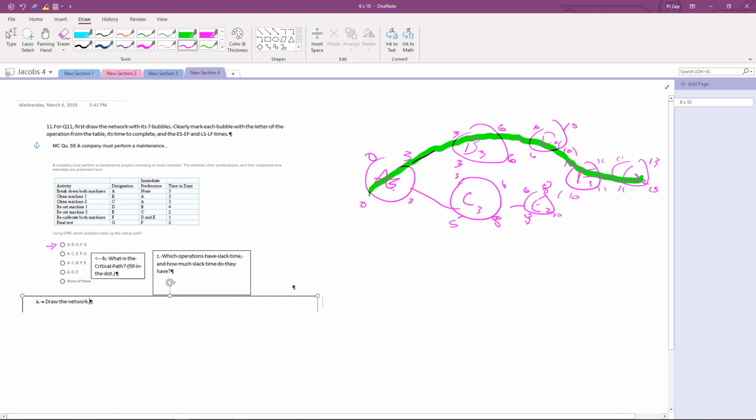And we already carried the 3 on the critical path back here because that's the limit. You have to think about that a bit, but that's the limit. There's no slack in A, we know that. It has to start at 0 and finish at 3. So we have slack on B and C, and they each have 2 weeks of slack time. That's as complicated as it gets. I think that's all we had to do here, A, B, C. There you have it.